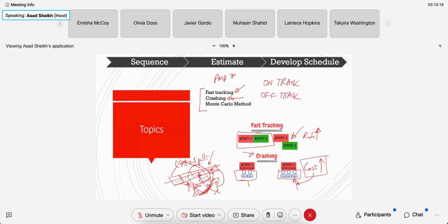of the house is in this critical path. So you're not going to touch the pillar, you're not going to touch the foundation, you're not going to touch the roof. You may touch the swimming pool. Or you may not do that, or the jacuzzi. You may leave the jacuzzi, which is not on the critical path. You can do without the jacuzzi, right? And you can do without the swimming pool because they're not on the critical path. But you cannot do without the roof. You cannot do without the framework, the foundation, and the interior of the house because they're all on the critical path.